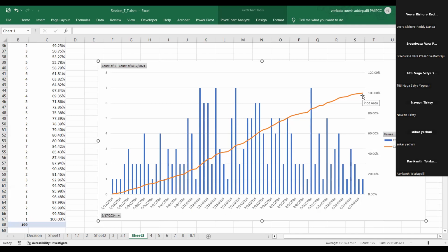And if you're on standard, let's say 80% confidence level is acceptable. Then you can pick up this number roughly. So 80% confidence is like 8/8. So you can quantify the amount of risk that you are taking. Now, if the organization says, hey, I'm going to go and commit to the customer that I'll deliver by June 1st, there's very little probability that's going to happen unless you do something magic.